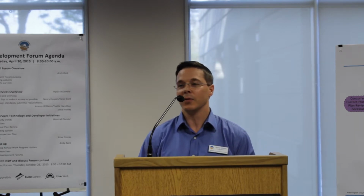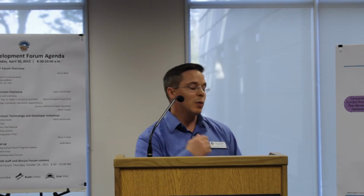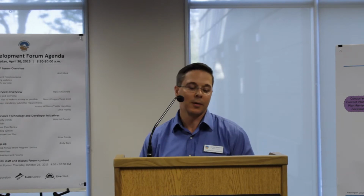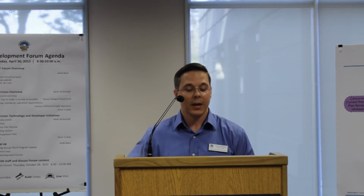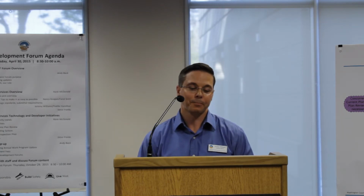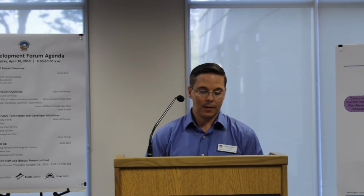Some of the things with plan review is we're trying to solve problems over the phone. If we see an issue during the plan review, if it's very minor in nature and we could redline with approval from the designer or the engineer, we'll do that first. Just do a phone call, try to get it resolved right away. And then the next step, if it's a little more complicated, we'll send a formal email listing everything specific and go through that route and wait for a response.